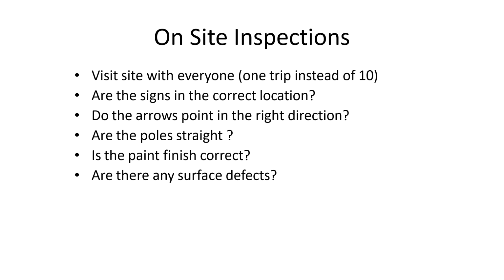We have to take care of a few things. The site visit with everyone, as I told you before, is very important. So, rather than doing more than 10 trips, it is advisable to go for one trip, but taking every stakeholder in the team. The stakeholder means the people who actually work for those services. This makes everyone on the same page.